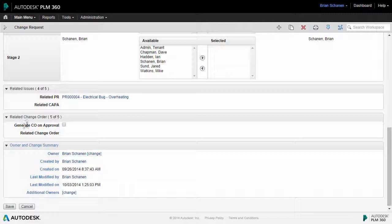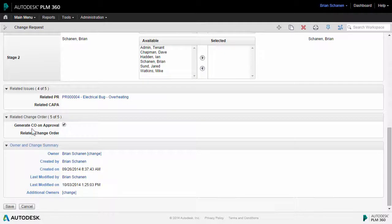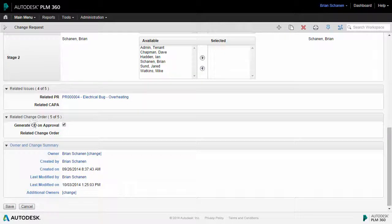So, on closeout, do I want to generate a change order on approval? Putting a check in this box means if I get through this change request and everything goes right and it is approved, it will automatically generate or spawn a change order much in the same way that the problem report generated the ECR.